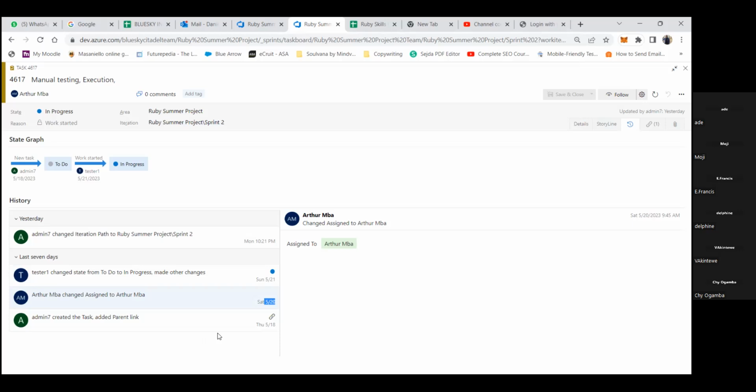If other team members can say, let's leave it, maybe when I finish what I'm doing I'm able to work on it, all well and good. If everybody's capacity is full, their hands are full, and your PO is in your meeting, you can check with the PO, knowing that we don't have capacity to work on this: is it okay for us to take this out of the sprint now? Because the person that worked on it is not available.